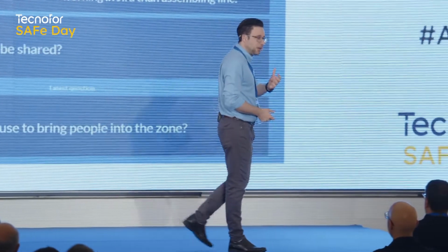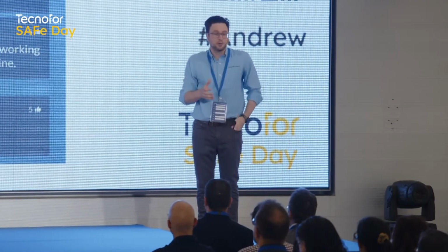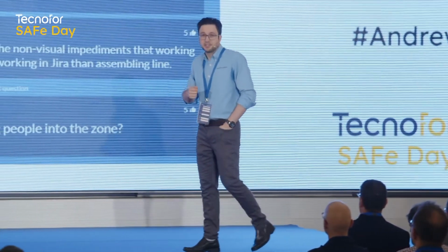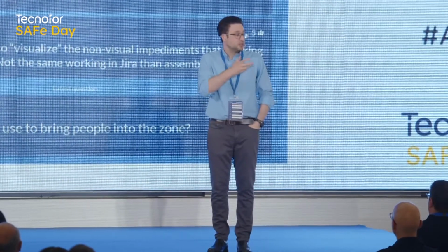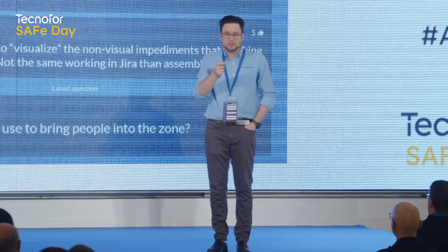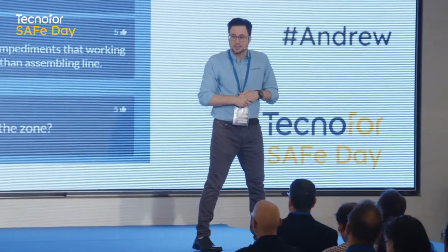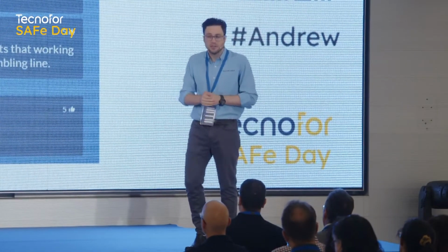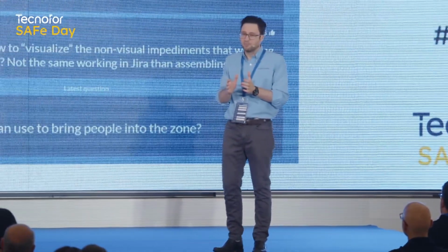To actually find it in practice, one of the things I think we want to do first of all is visualize the flow of work. If we start to see that the flow of work is creating bottlenecks within each step, perhaps that means that the batch size is too big, we can't process it quick enough to alleviate those bottlenecks. The other thing, of course, is if we start to see predictability being affected, it's another good indication that potentially we can look at the batch size of our features to make them smaller, make them easier to deliver in a shorter period of time.